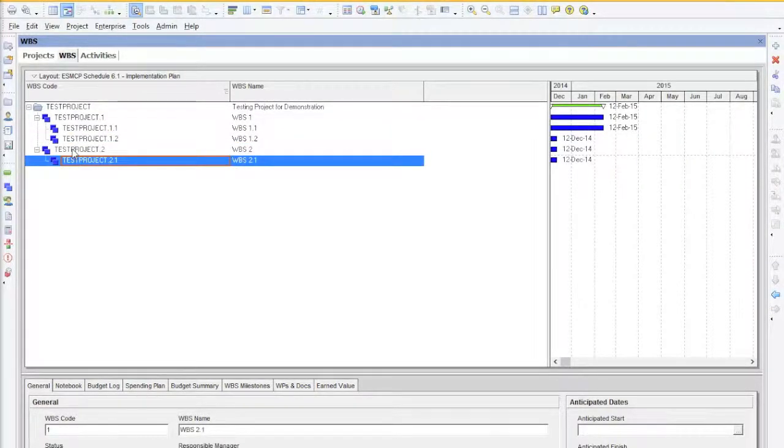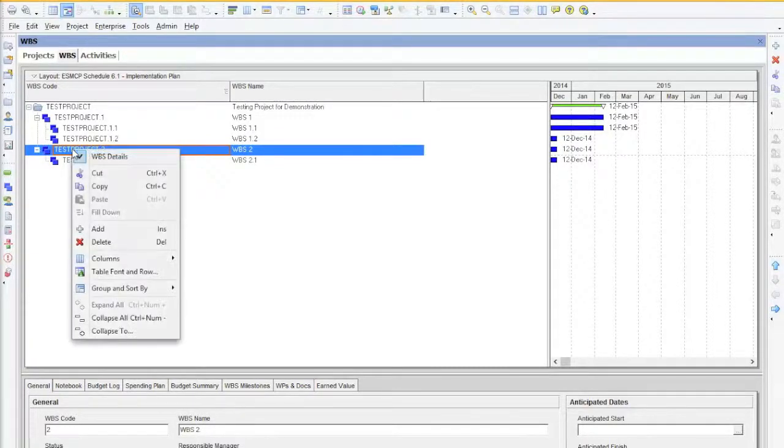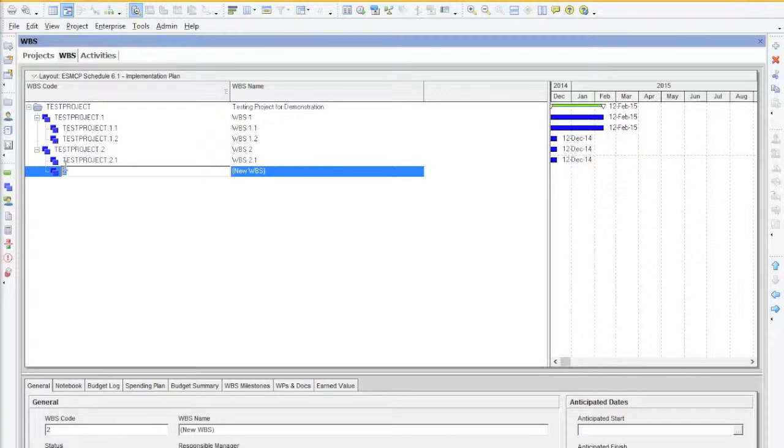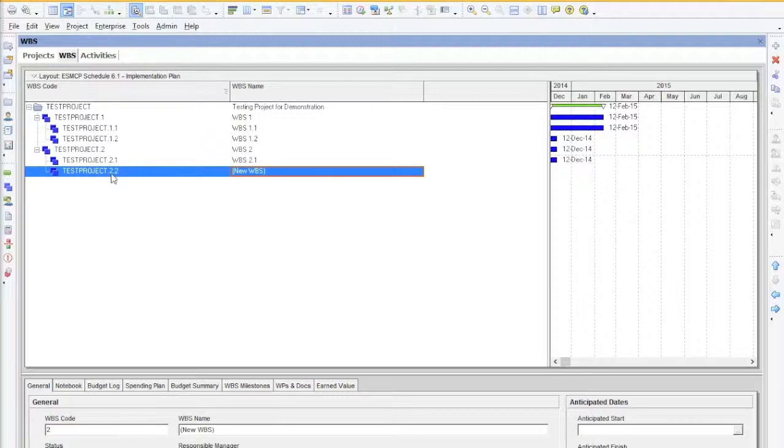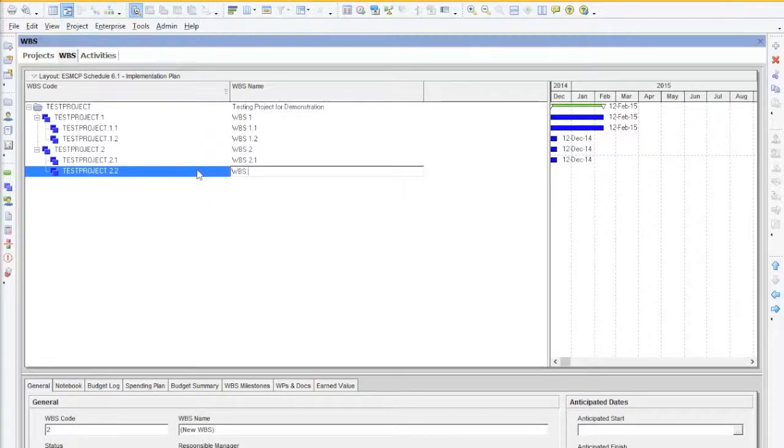So if I was to add a WBS element, I can right click, I can click on Add and I can type in my new WBS which auto allocates the number 2. So I will have WBS Test Project 2.2 and I can create a new WBS name, in this case 2.2.